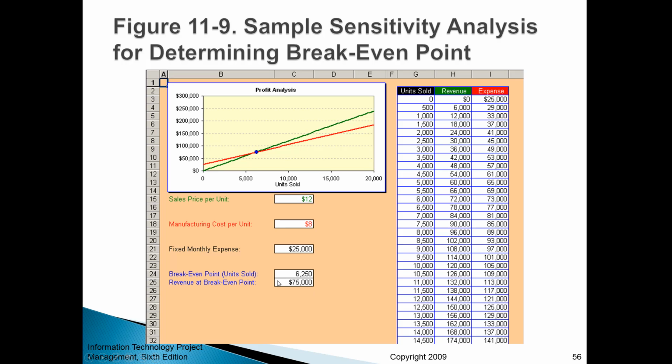And the reason it's called sensitivity analysis is that you change one or two variables and you see how sensitive your outcome variable is to that change. So you will say, okay, let's say I want to decrease the price by $1. So instead of 12, you plug in 11, and then you'll see a totally different outcome here. So that's why it's called sensitivity analysis. You change the input variables and you see how sensitive your model is in responding to those changes in underlying independent variables.